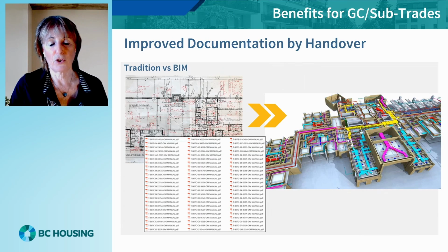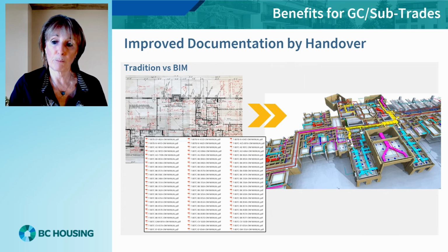BIM enables the creation of accurate and complete documentation where installed asset information, data, and documents are associated to the model object. Information required to support development of preventative maintenance is available during construction, with the entire project dataset available at handover. This provides owners with all the necessary information required to improve management of the facility throughout the project lifecycle. This adds significant value for the client.